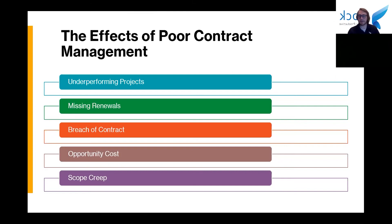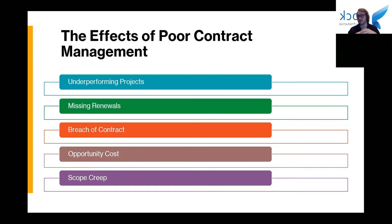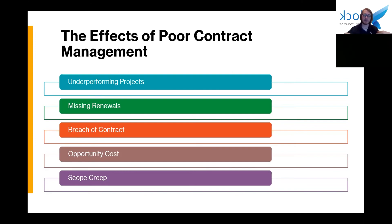Going back to opportunity costs: money spent on underperforming contractors and bad products is a waste of time. If your contractor isn't doing what they're supposed to, but they have an auto-renew clause and you're not paying attention, suddenly you have another six months to a year of paying for that. Any money and time spent rectifying failures in the contract management process is money and time you could be spending investing in other areas of your business — things that will actually improve your bottom line.